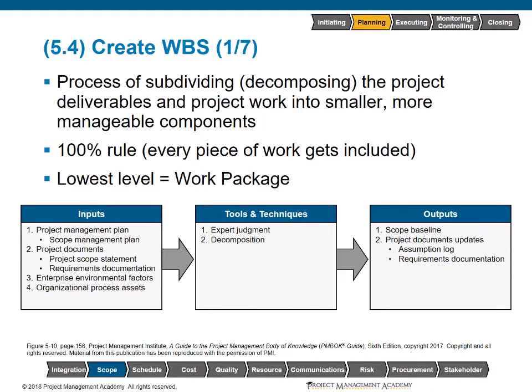Create WBS. This is a process of subdividing or decomposing the project deliverables and project work into smaller, more manageable components. A couple key aspects of the work breakdown structure. A very important piece of this is the 100% rule, which is that every piece of work gets included.